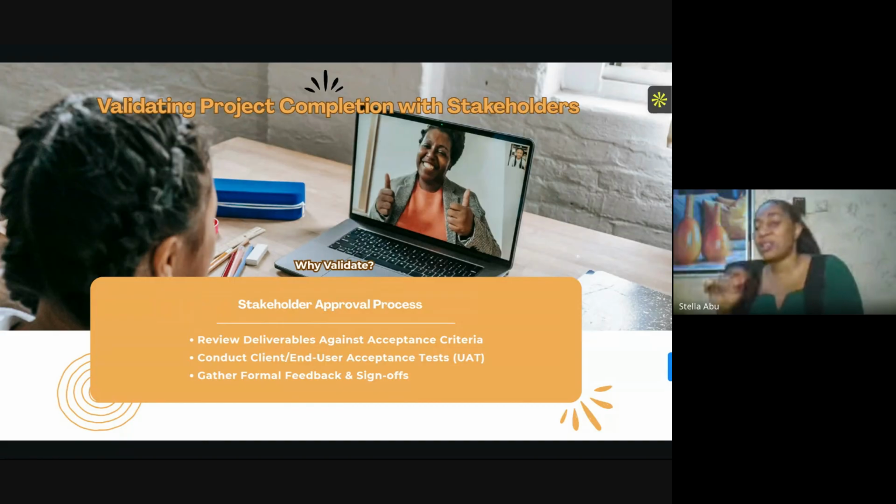Now, at that point, even if you have a fine design, even if your webinar looks so fine, and there are a lot of people that came for the webinar, right? If that webinar doesn't have farmers attending that webinar, then there's a problem. Because I am not just checking your deliverables in isolation. I am checking your deliverable based on what I asked you to do, right, in the project criteria.